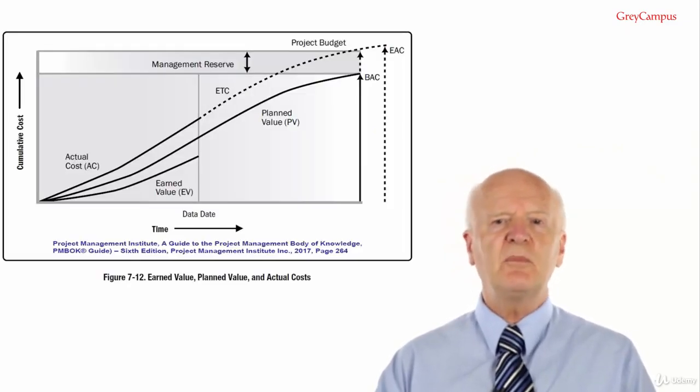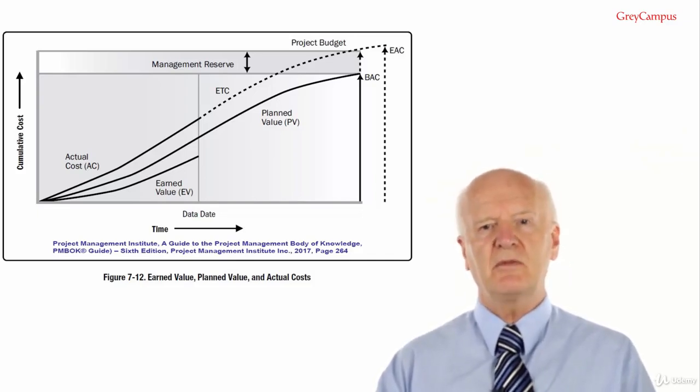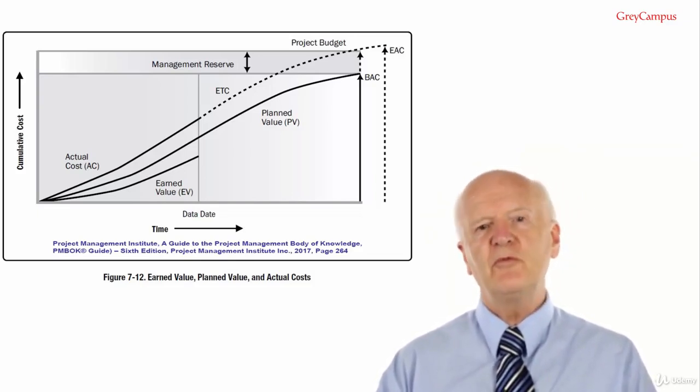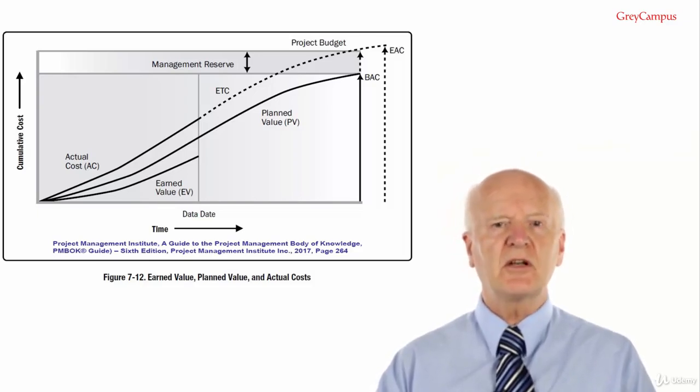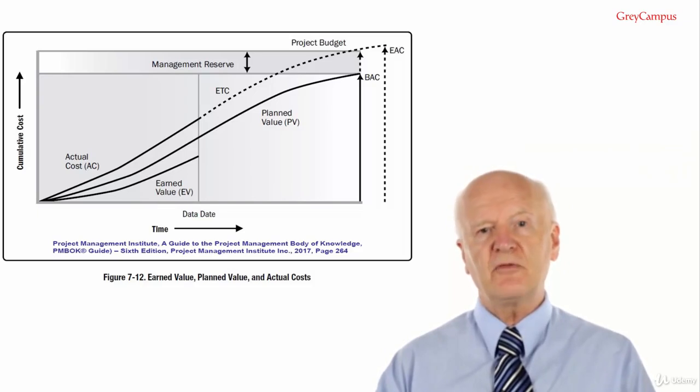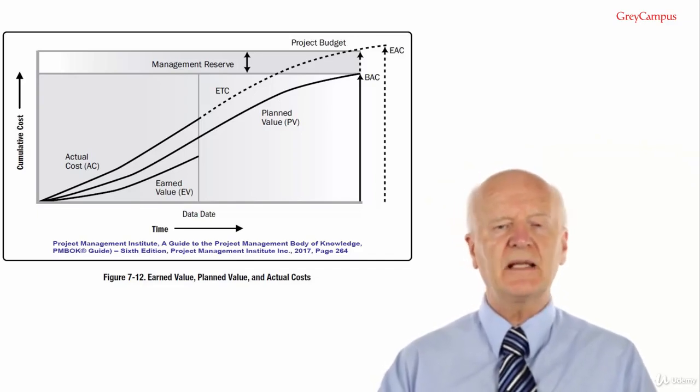The next earned value analysis technique is trend analysis, which examines project performance over time to determine if performance is improving or deteriorating. Examples of trend analysis include charts. These enable planned value, earned value and actual cost, the earned value analysis variables, to be easily monitored and reported for each period, typically weekly or monthly and on a cumulative basis as well. Figure 7.12 uses S-curves to display earned value data for a project that is performing over budget and behind schedule. Forecasting.